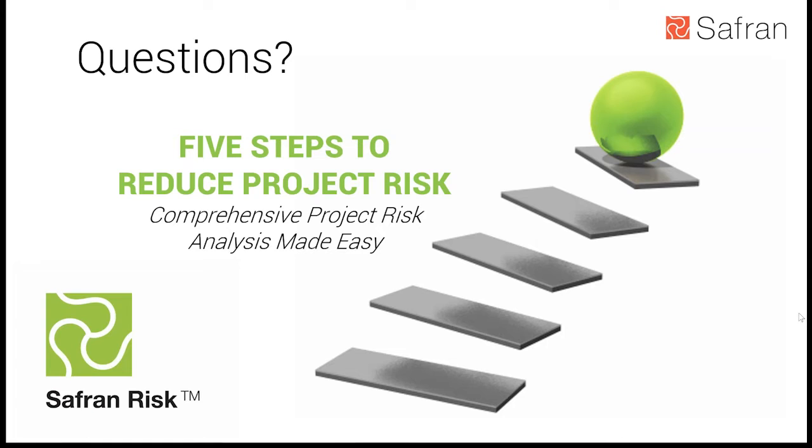Not natively in the application right now. I think what you're getting at is, how do you really know? Where that information can come from is a couple of different sources. If you have a qualitative risk register, many times there's an implied percentage range or thresholds that are set as part of that qualitative risk register, and so you can use that as a starting point.